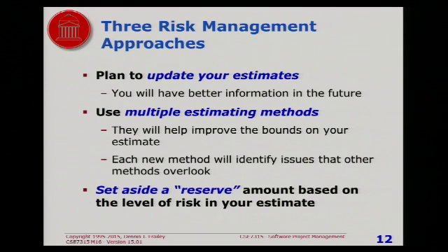Now, what do you do about the fact that you know that this method is not necessarily precise? Well, plan to update your estimate. Say, okay, at this point we don't know much. We think it might be 500, but it could be as much as 1,000.